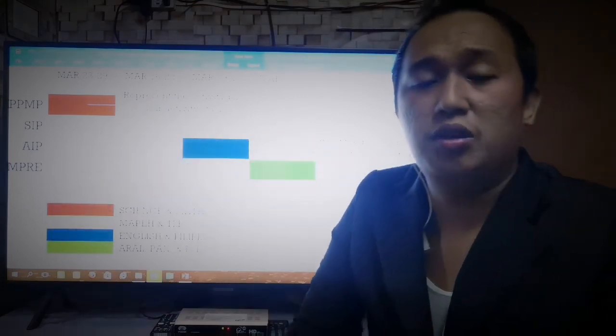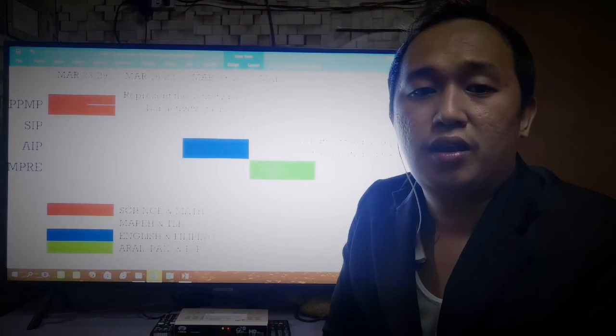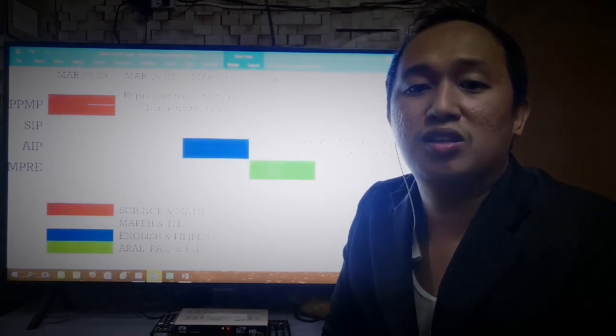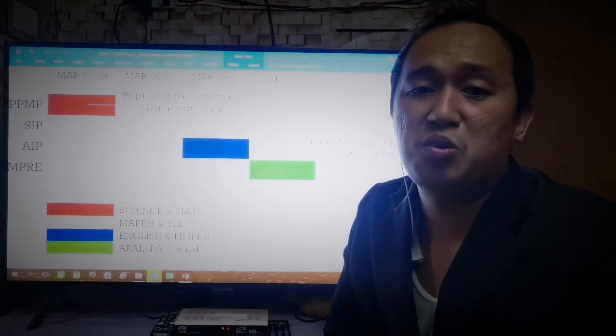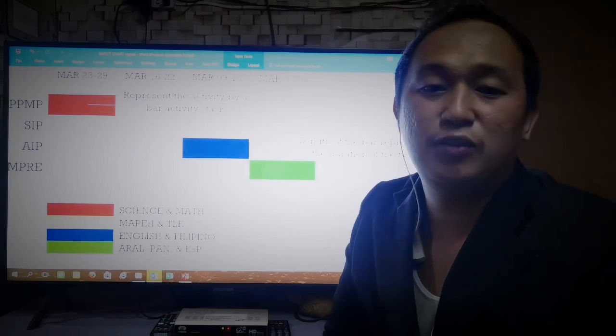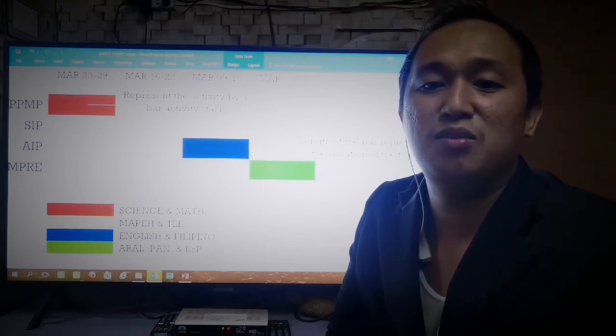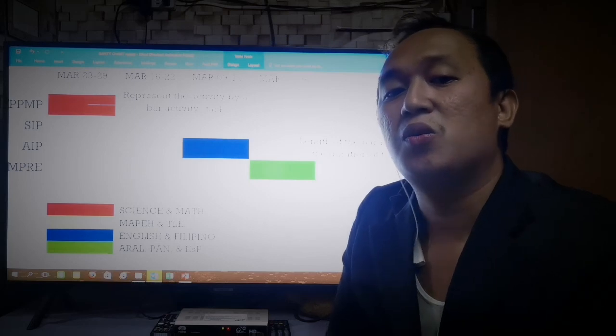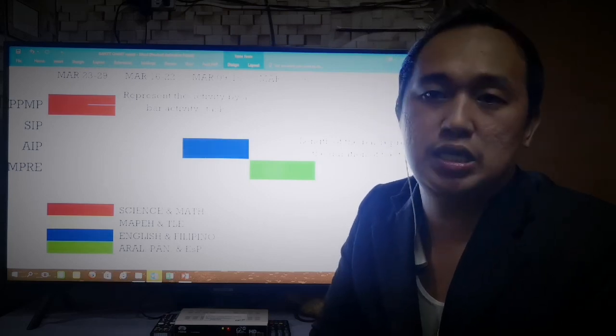And what is good about this Gantt chart, it is useful for progress tracking and progress reporting, but not so great for planning and organizing because they have no lines or no interdependencies.